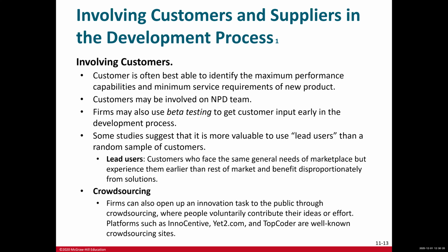So this is very important because we want to involve customers in our agile methodology, and we want to receive feedback. There are many different ways to receive feedback. Whenever we have reached the level of the product we call the beta version, like the MVP that I was talking about, it's a version that we can present to the customer to receive their feedback. That's the version that actually has enough features to present to the customer.